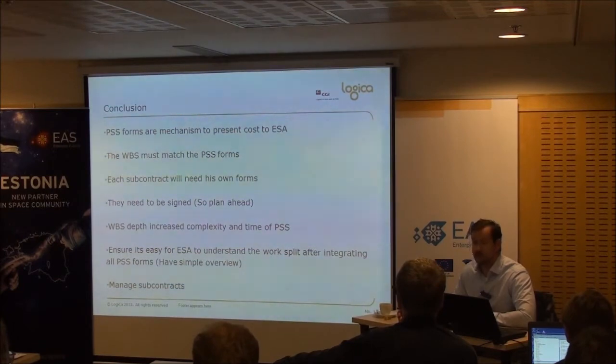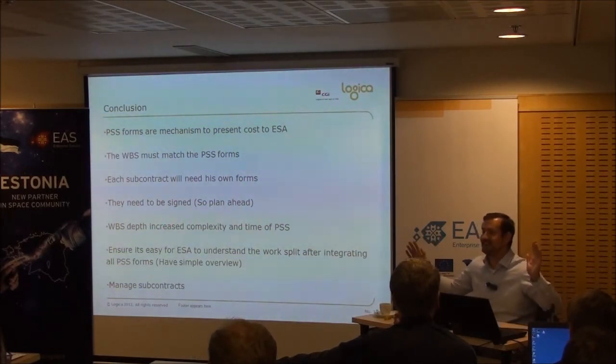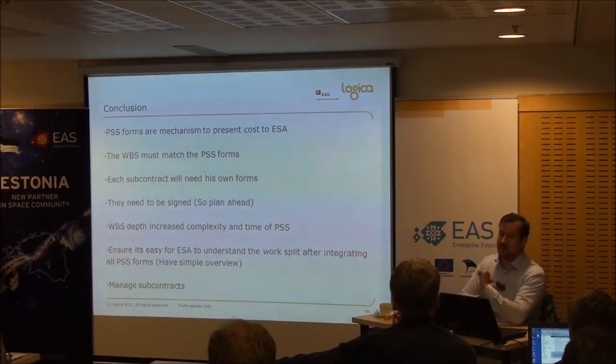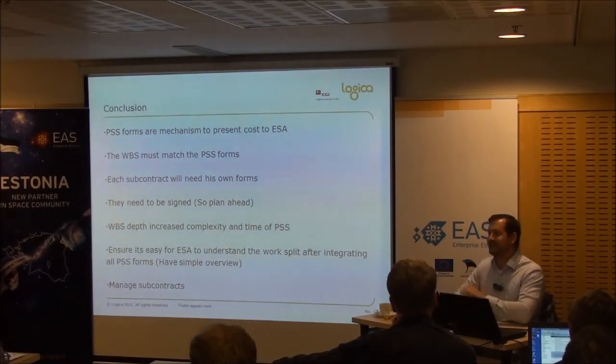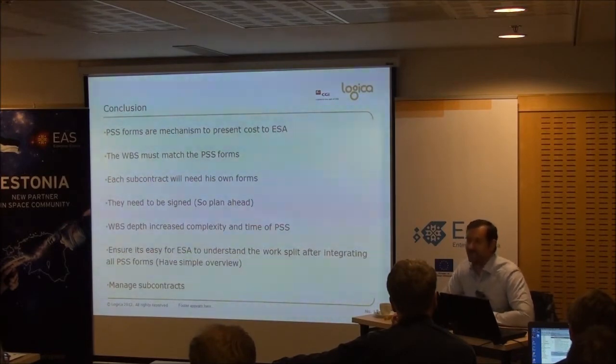And manage those relationships throughout the bid period. Be proactive. Bid management on a big proposal is a very, very timely job. The only tip I can give you is, if the job's quite large, try not to have the bid manager owning any document at all. That can be very painful towards the end if he owns every document. Because as you move along, he's getting challenges from subcontractors, challenges on price, and he's also trying to integrate all the technical documents that other people are giving him. That's very, very painful.